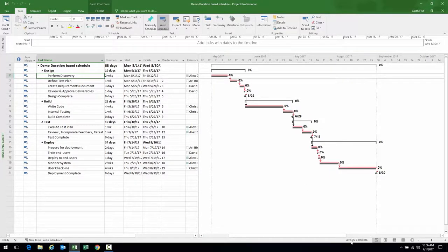You'll notice in the bottom right, the save status is alerting me to where are we with this save. Right now the project is being saved to the draft schema in the database. Therefore, if you tried to look at it in Project Center and Project Online or Project Server, you would not see it. You actually have to publish the project to see it in Project Center, which I have not done yet. Therefore, we're still at 0. And this would probably be a normal thing. A lot of project managers would not publish their project till it's ready for prime time.